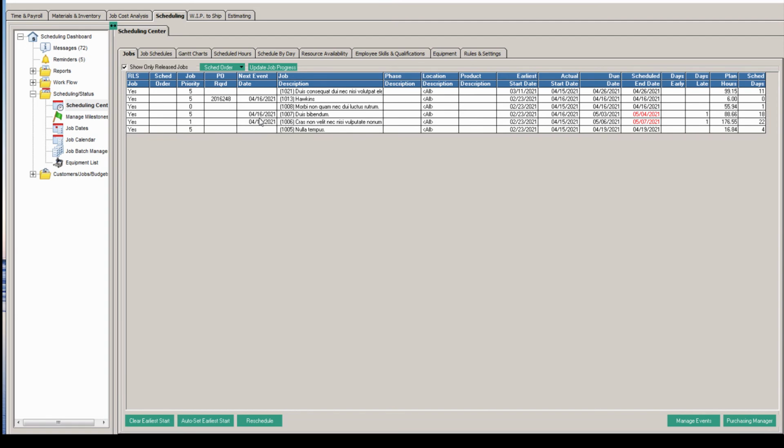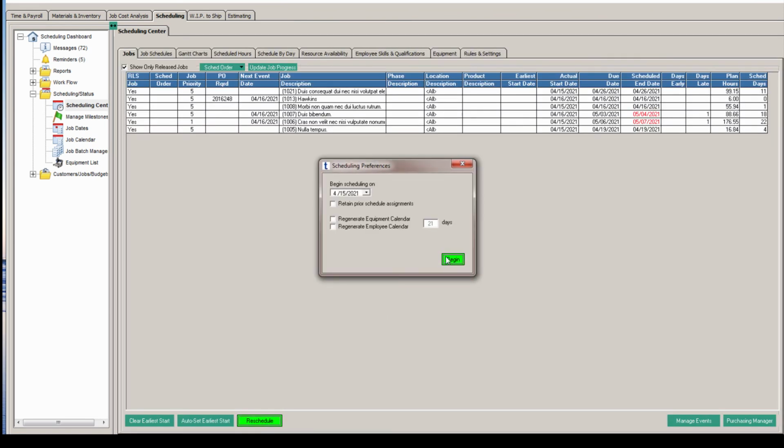So to the priorities, for instance, I can clear the priorities, clear the earliest start dates. You can set earliest start date. I can clear that. It'll automatically update that. I can set the priorities. Normally, 0 is more preferred. The higher the priority, the less preferred it is in the numeric value. To schedule, you just simply click reschedule.